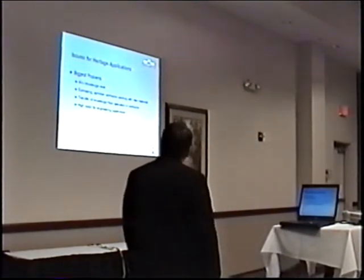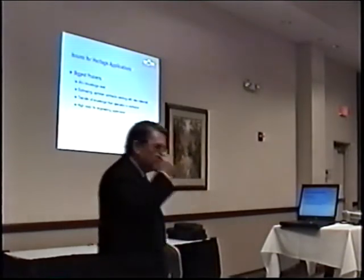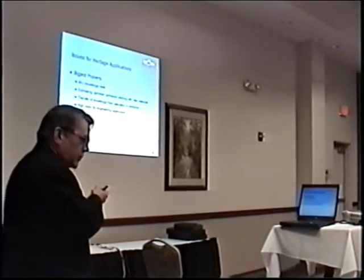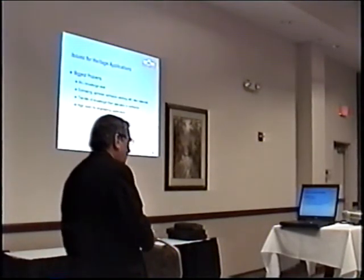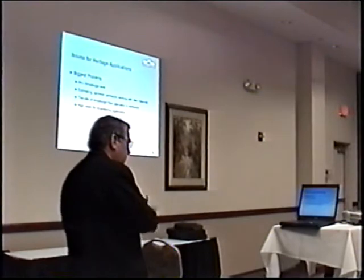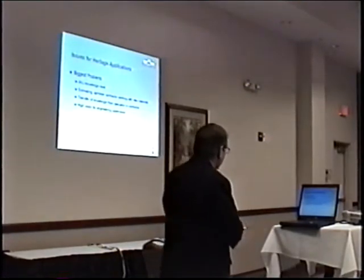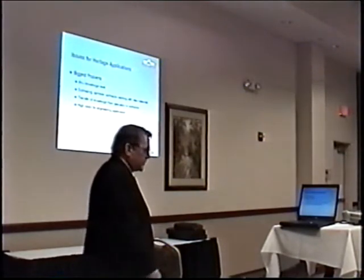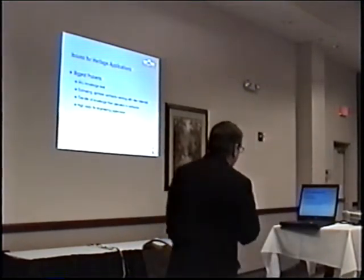Biggest problems: authority having jurisdiction, knowledge level. On the National Gallery of Art, of course, they could act as their own authority having jurisdiction, and they were very interested and they were willing to make engineering decisions. In the state of Alaska, they have a very willing state fire marshal's office, and they basically have made a point of accepting water mist systems and the machinery space modules and such on the North Slope. So they have a significant knowledge level. But you can't just walk into the state of Minnesota and go to the fire marshal's office and plop down a set of water mist plans and get it approved. Not easy.